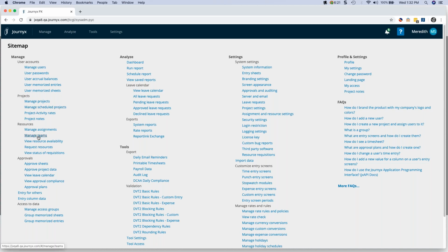So we added something that we call team assignments. The idea here is that when you are planning for future work, when you need to know what your future capacity looks like, who will be called up to do these future projects that you have either committed to or perhaps are looking into committing to, you need to know what demands you have on people's time. It may be by skill or location or however you organize those resource teams.